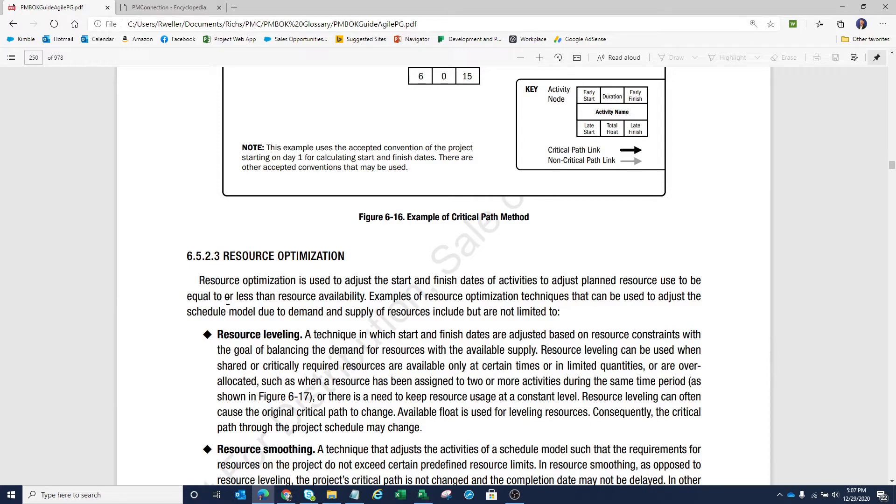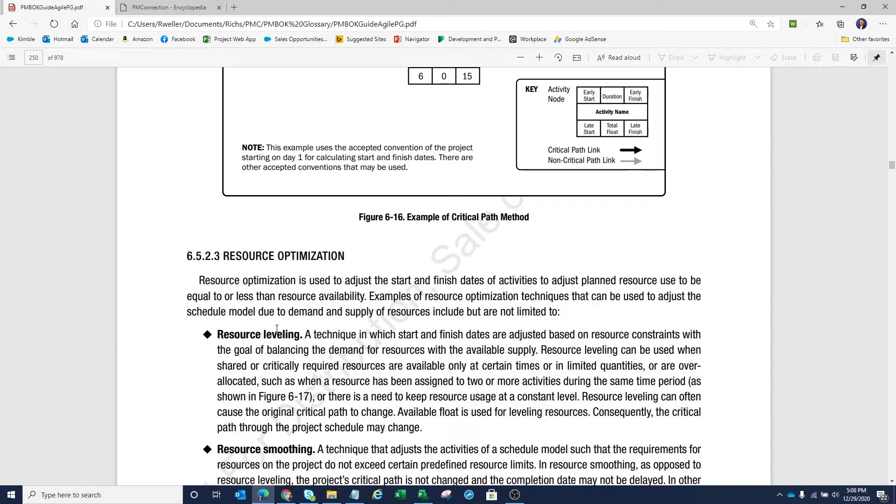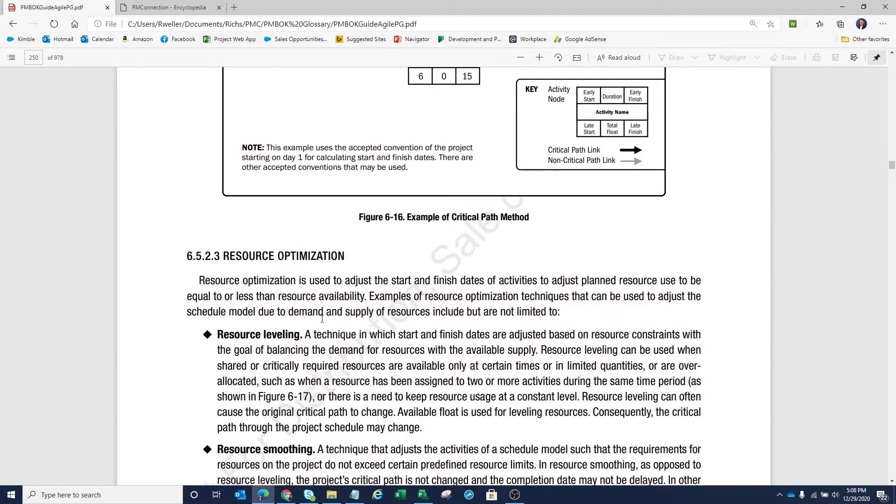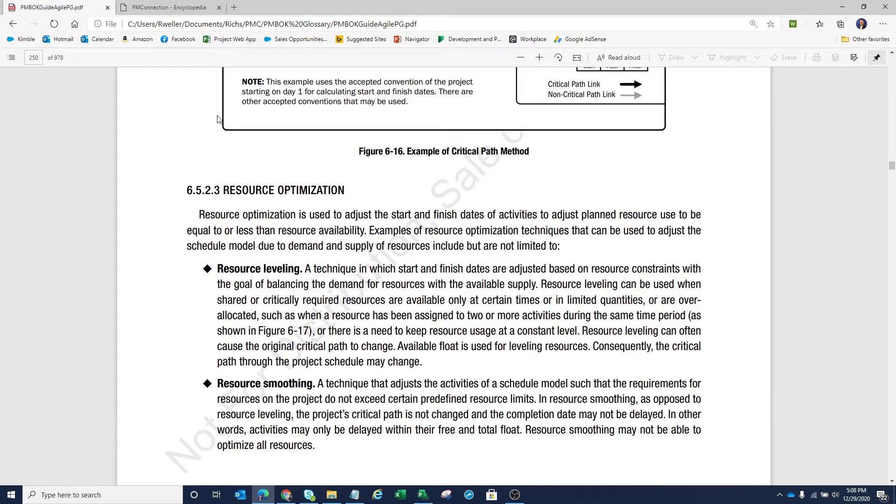And it also says examples of resource optimization techniques that can be used to adjust the schedule model due to demand and supply of resources include but are not limited to these two items here: resource leveling and smoothing. And there's a lot of words here when it comes to both resource leveling and smoothing.